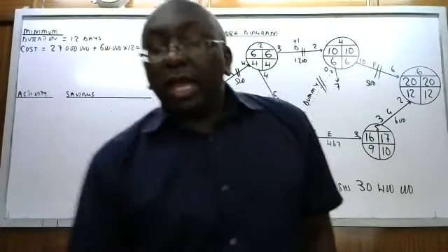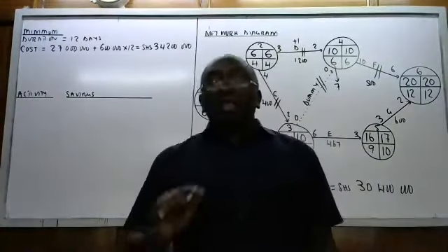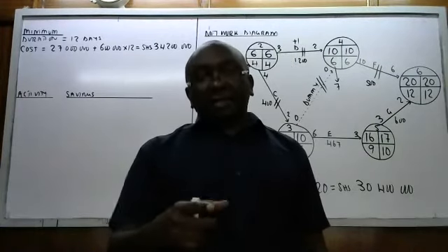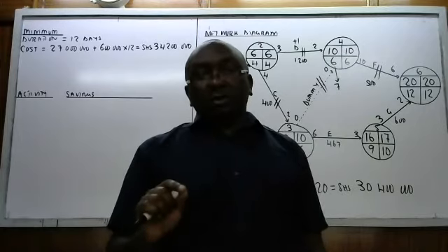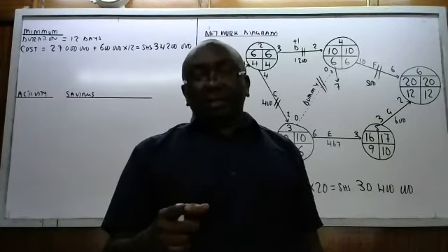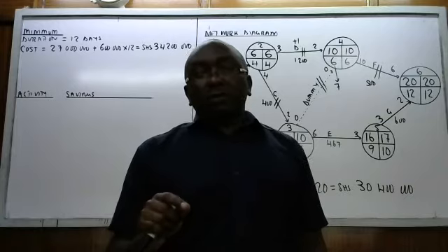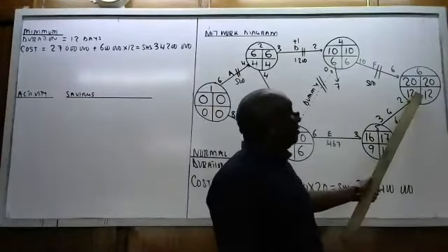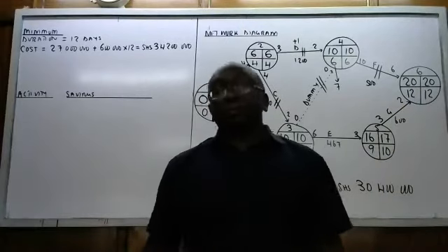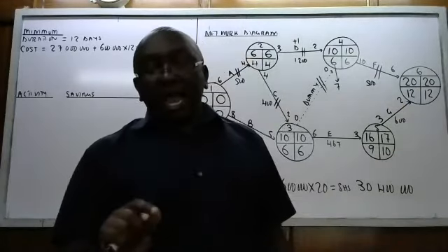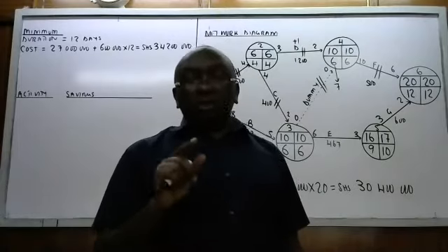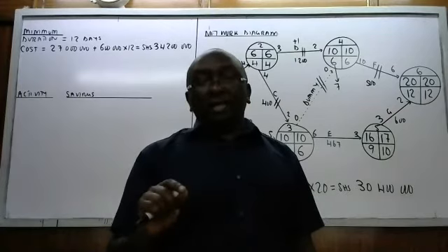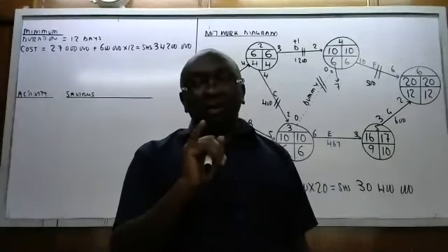Eliana, the general rule is you uncrash the non-criticals as long as they don't affect the completion time of 12. That is the rule. But then this question introduces something else, that every day you are on that site, there is a cost of 600.